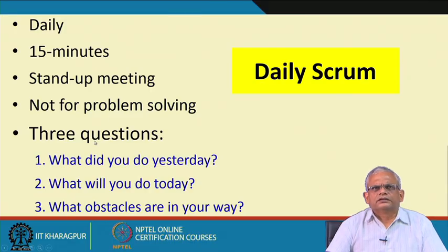Basically, each team member answers 3 questions. What did the member achieve yesterday? What is the plan for today? And are there any obstacles? These are the only three things that each team member answers and discusses.